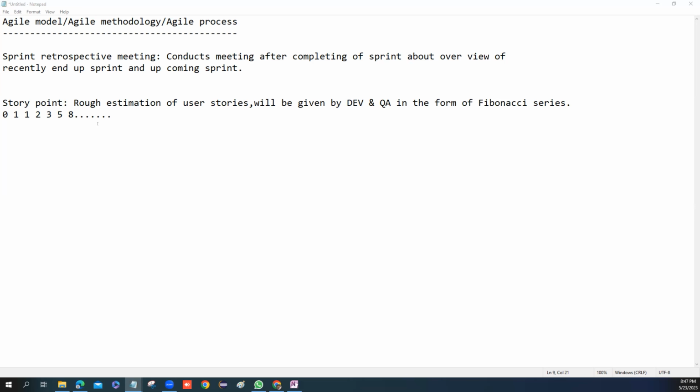If the developer has any questions, the BA is going to clarify those product backlog items and say, okay, this is the process you need to work on. This is the sprint planning meeting. Remember that it happens on the first day, the beginning of every sprint.